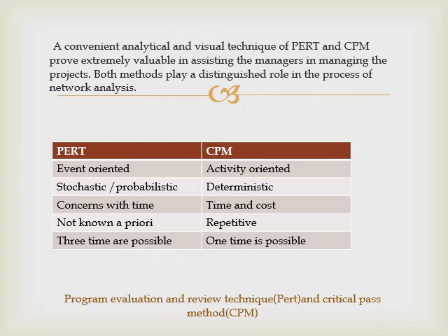Let's jump to the critical path method. Since CPM was developed in connection with construction projects, which consist of routine tasks whose resource requirements and durations were known with certainty, the work is repetitive.